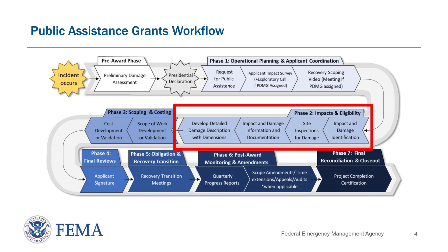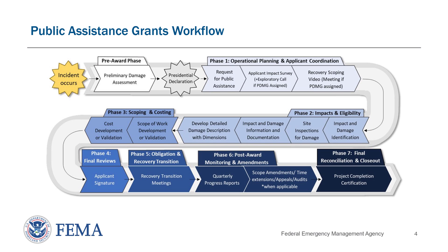The PDMG will review the EEI responses and documentation and submit the project to the Consolidated Resource Center, or CRC, for review. The CRC will then begin Phase 3, Scoping and Costing. The PDMG and the recipient may assist the applicant at any step along the way if needed.